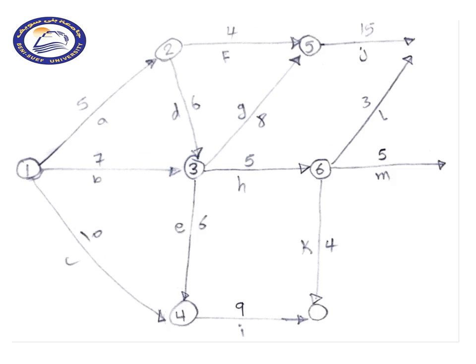Here activity L, M and K are dependent on the finishing of activity H, like you can see, but activity L and J will be connected with a dummy according to the exercise given, and activity K and I should be together in order for activities N and O to start, and activity M will have to wait until we see what is dependent on it.